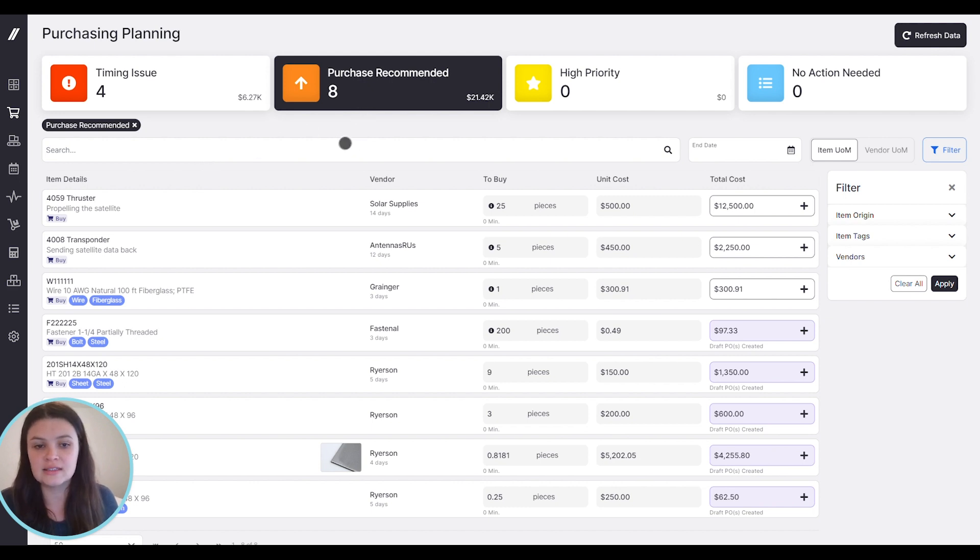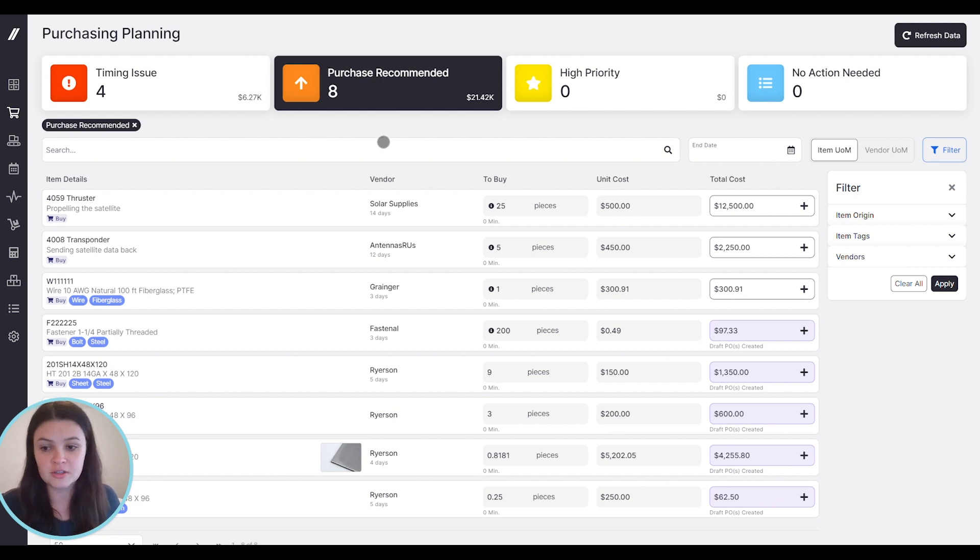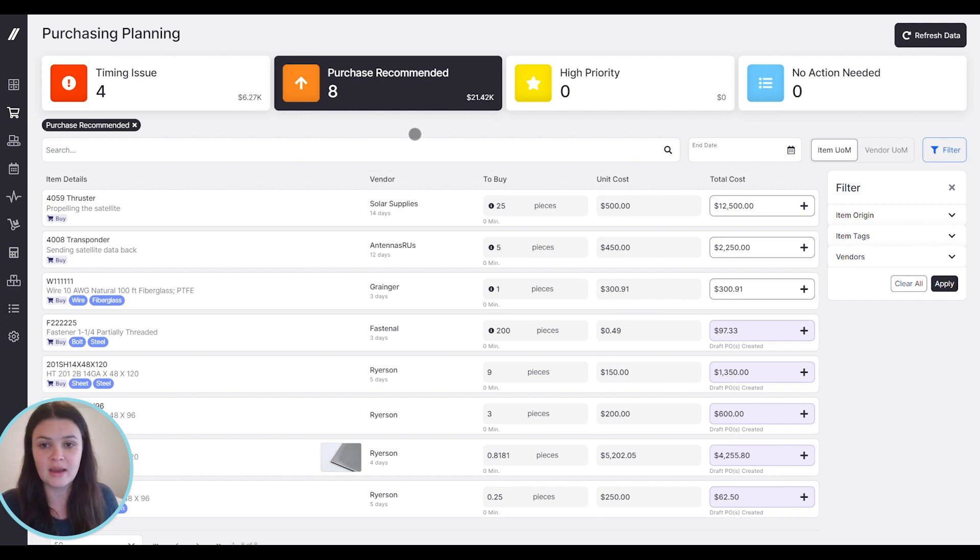Not only does this give you purchasing recommendations, but it also ties into scheduling. So it's taking into consideration when jobs are scheduled, when you need to purchase material, and then your schedule is impacted by when you create those purchase orders.